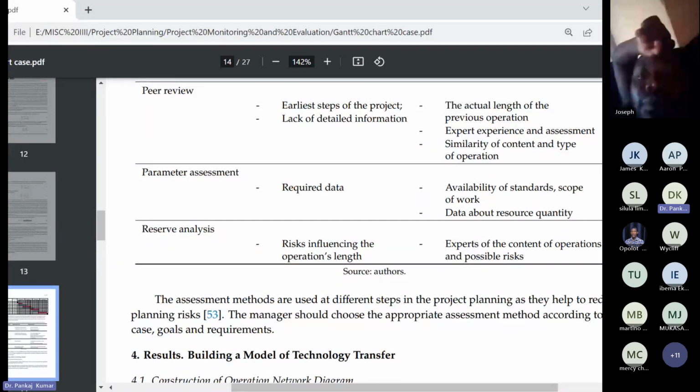We can also talk about management reserves, which are additional time or resources set aside at the project level to address unknown or unexpected risks that were not identified during the risk assessment process. Like contingency reserves, management reserves are typically under the control of senior management or project sponsors and are accessed in exceptional cases. They are not allocated to a specific task or activity.